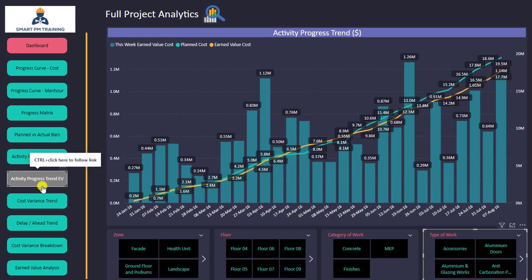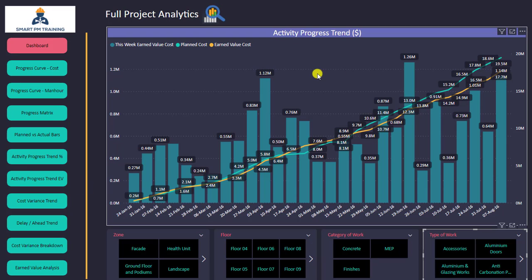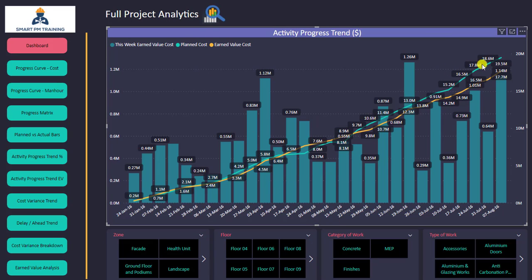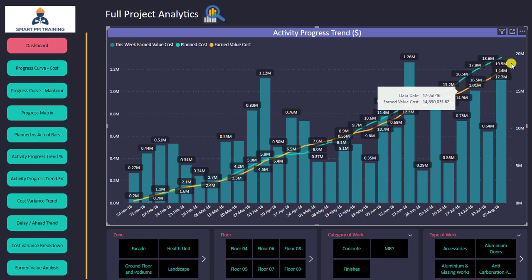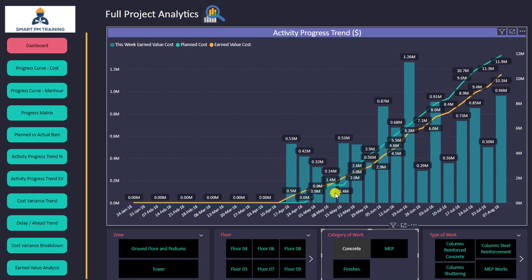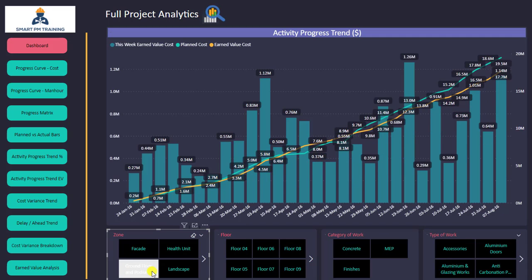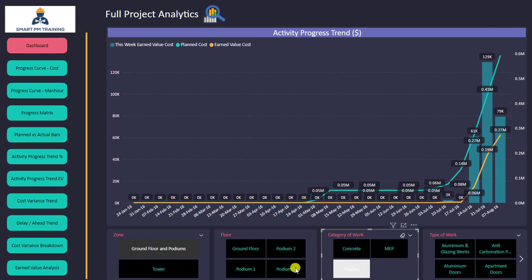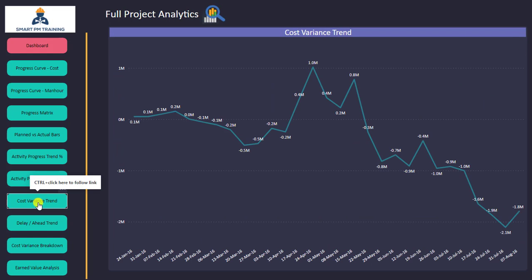I'll now go to the progress trend based on earned value. It's similar to the previous visual, but shows earned value analysis rather than activity percentage. On a weekly basis I can see how much I've achieved, the cumulative actual, and the cumulative planned — all based on earned value cost. I can also go to concrete and the chart is automatically updated.